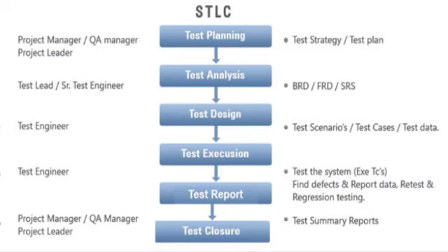Through these 16 attributes, testers will plan what features to test and what not to test, what strategy they have to use, and what resources they are going to need, etc. Simply, we can say that test plan is a plan which specifies how to test the application under test. After test plan, testers will design the test which falls under test design phase. In this phase, testers are going to write scenarios and test cases.